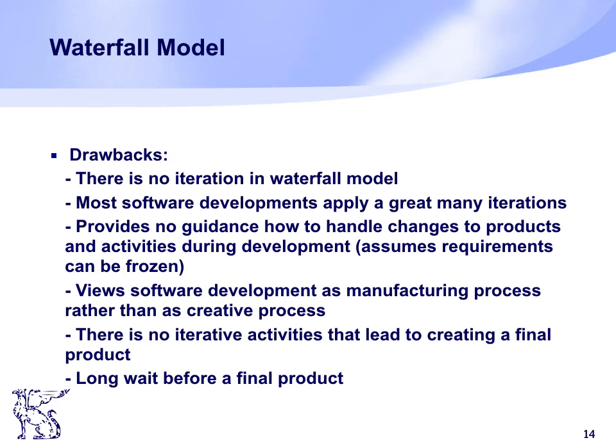The other real drawback is that it's difficult to accommodate change requests. This model assumes that all the customer requirements can be completely and correctly defined at the beginning of the project, but actually customer requirements keep on changing with time. That's why it's difficult to accommodate any change request after the requirement specification phase is complete.